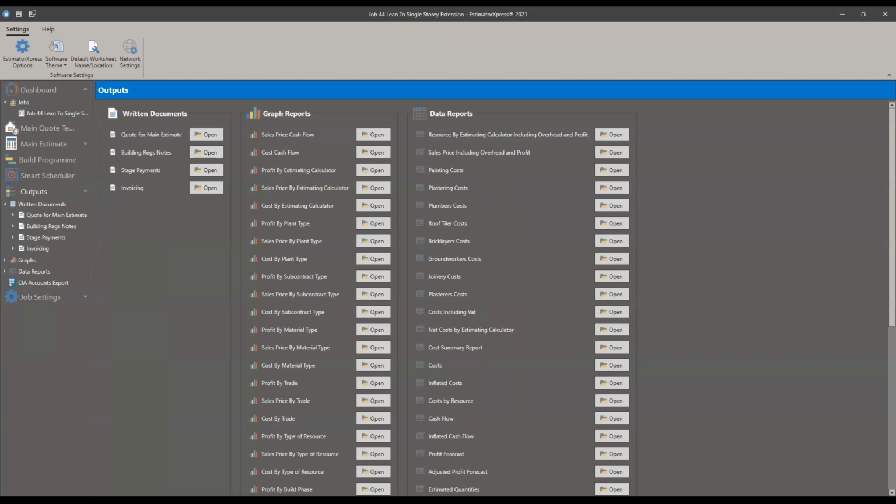Stage payment calculator, which allows you to set your payment terms and print that out for the customer. Very useful, as you can set a deposit and the payment increments, whether based on phase or time, and then preview that so you can see if you're ever going to actually be funding the job yourself. It's a very useful tool.